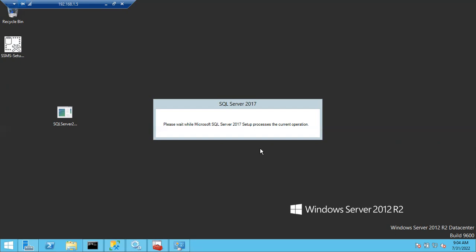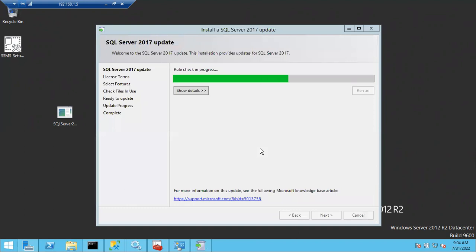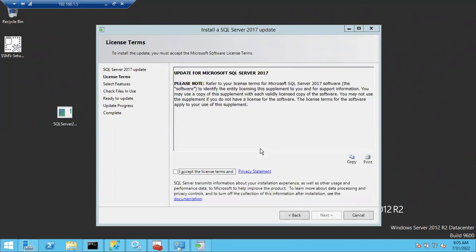In the ticket mention 3 hours downtime. In the change request, you have to mention the time slots from when to when you are planning this change, from Saturday morning 10 o'clock to afternoon 1 o'clock. You have to give the time slot. Then if something goes wrong, no one is going to ask you during that window. Even though you restarted 100 times during that window, no one will ask you. Why? Because that is a planned activity, so you have a proper change request and no issues.